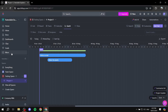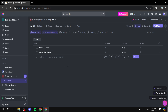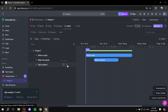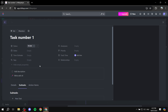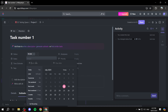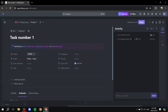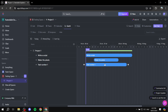If, for example, we go to the list view and create a new task — task number one — and task number one does not have a date, we can go to Gantt and we will not find it. There is no arrow indicating we can navigate to it because it has no date. This is something you need to understand: the Gantt view requires a date for a task to show up. We can fix it by clicking on the task, going to dates, setting a start date of today and a due date of August 1st. Once we exit, we can see it pop up right away.